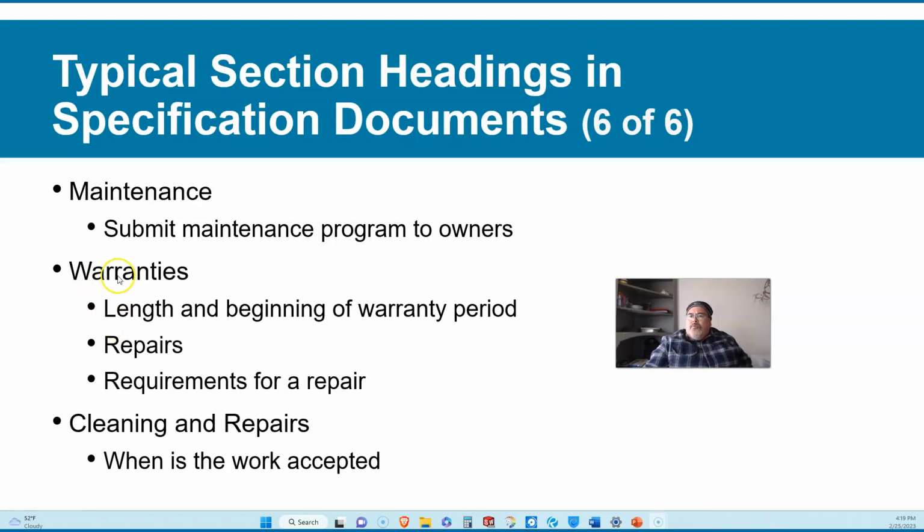So there are rules that say maybe inspections need to be performed to verify that the installation was done properly, so that the manufacturer can assure that they're going to give it its 60-year warranty. So certain protocols must be followed so that owners are ensured their warranties. Remember that when an owner is purchasing a product, they're not just purchasing the product itself, they're purchasing the product and a warranty that comes along with it.